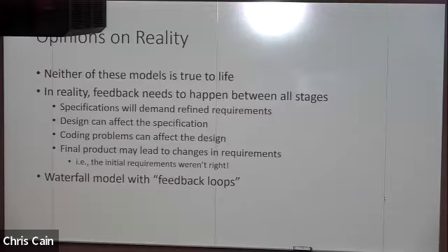So how is this done in reality? Neither of these is really true to real life. You can't do everything in one pass or in two passes, but there are good ideas from both of them. We need feedback at every stage level in waterfall, really. Once we write the specification, we need to go back to the requirements and change the requirement documentation based on the work that we put into the specification.